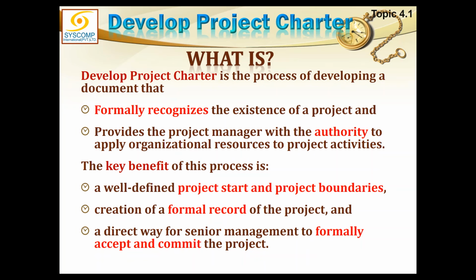Develop project charter is the process of developing the document that formally recognizes the existence of the project. Without this document, there is no project at all. There is no proof that there is a project. This is documentary proof giving due authority to the project manager to mobilize the resources.